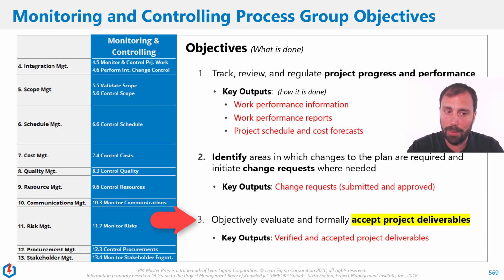All right. So I'm going to explain something here. It's the flow of deliverables. Think about in executing, we said we're producing deliverables. That's what we're there for, right? Absolutely. So think about to the left of here, that process group is producing deliverables, tons of them. So what do we need to do next? We've got to see if they meet the acceptance criteria that we established earlier in the project. Do they meet the acceptance criteria?